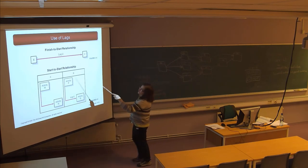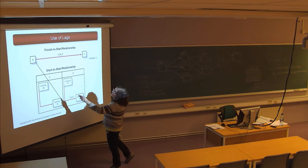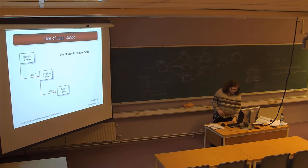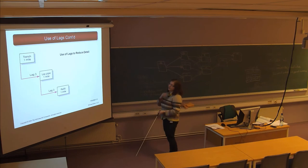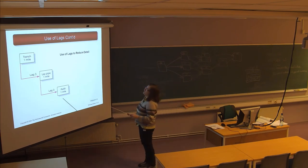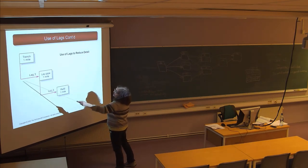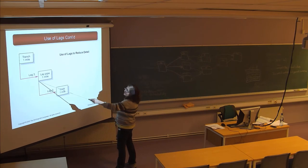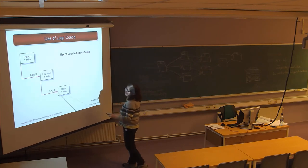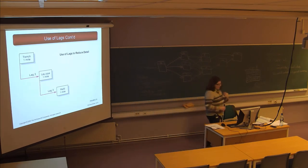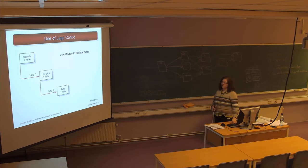For the trench example using a start-to-start relationship: you dig one-third of the trench, and then there's a three-day delay before you can lay the pipe in that first third. Then there's another three-day delay before you can do it in the next section. So you're only digging one-third of the mile at a time, not the whole mile.